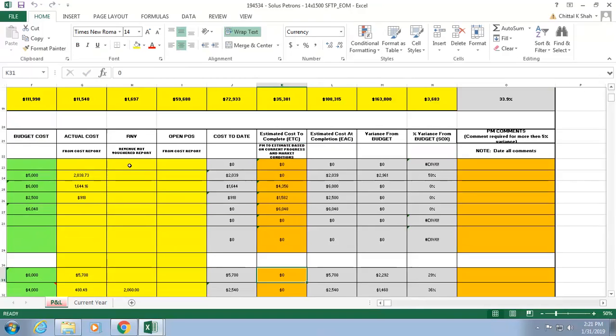How do we say we add value? If you see something as an actual cost, or if you see something in R&D, which is we have the part but we haven't vouchered it, those two values become our recognized revenue. Yeah. So the actual cost is when the payable has already sent it in. Correct. So that actually will move into column G, right? So it will jump from H to G when it's vouchered, it goes.